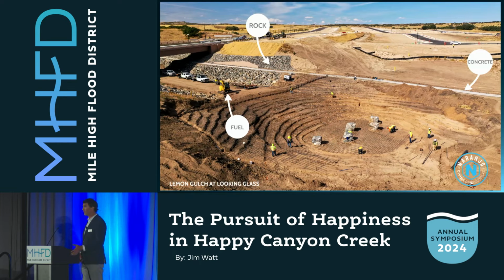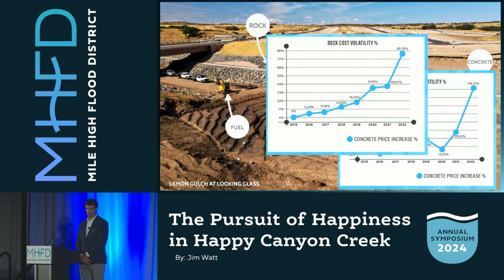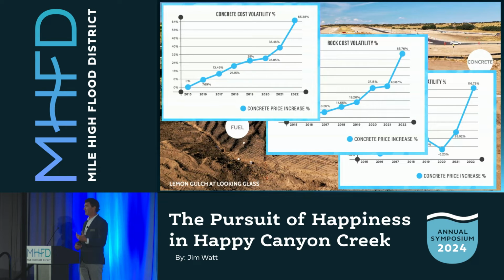Switching gears a little bit, we're really thankful to have had a contractor participate in the design process. Having Naranjo on board to help out with value engineering and understanding budget risk is really valuable. But one thing that was especially valuable is that we were approaching construction in 2022 when the cost of everything in the world was just going crazy. So being able to pinpoint a realistic budget for the project was really helpful. As you can see, costs of fuel, rock, and concrete were just going up and up, which are some of the main parts of our project.